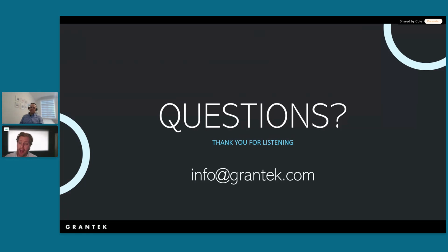And then when it actually comes to commissioning some of these systems, we actually prefer systems to be running at the point where the electrical and mechanical install is done, the equipment's all in place and IO checked. At that point, we want the system to be running because we're trying to tune the system and make sure it's fine-tuned and running at peak performance. So that's just something to note, where we actually look for an overlap between that downtime window and actual production startup.